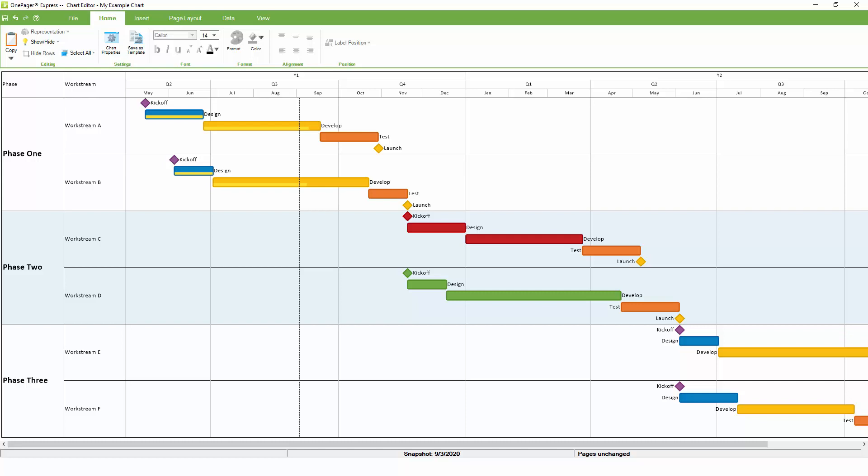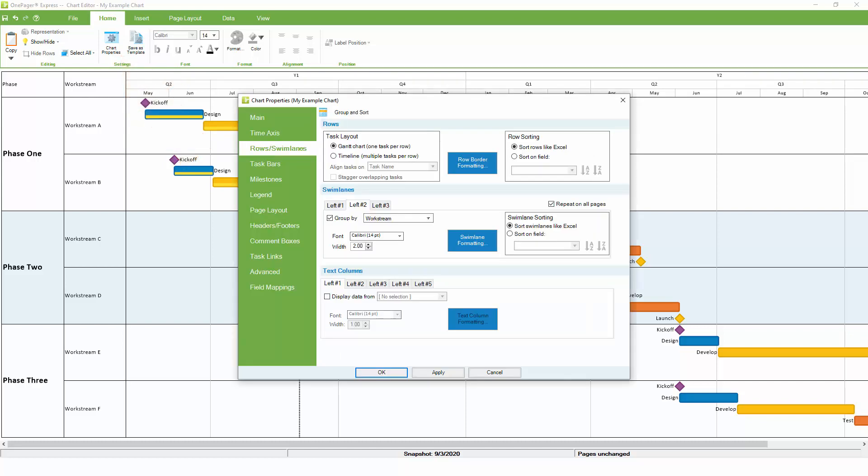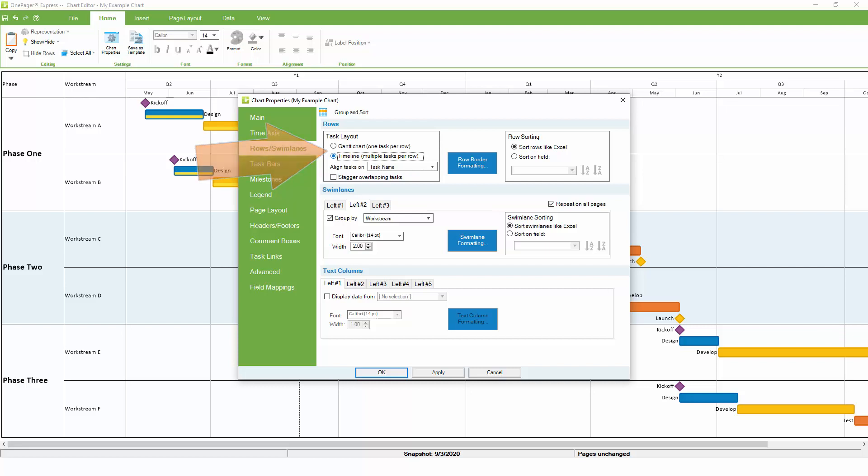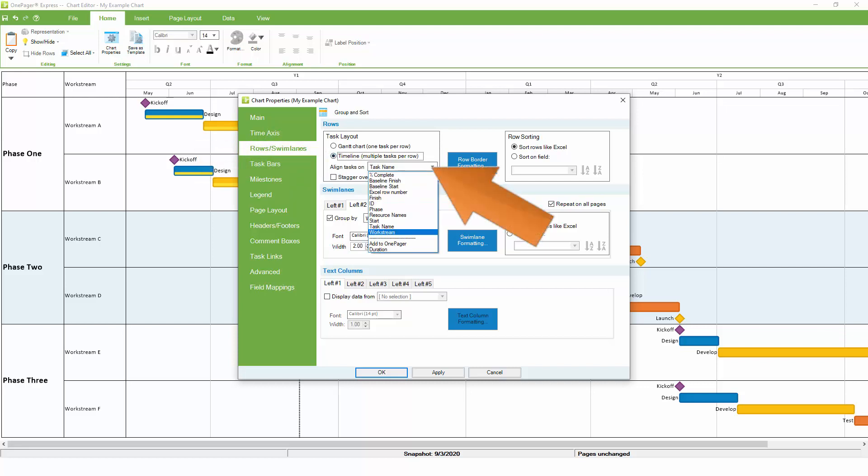Another frequently used setting is the layout, whether you want to create a timeline or a Gantt. If we return to the Rows and Swimlanes tab, notice that we're currently set up to create a Gantt chart with one task per row. We can change this setting to create a timeline, in this case based on the workstream.